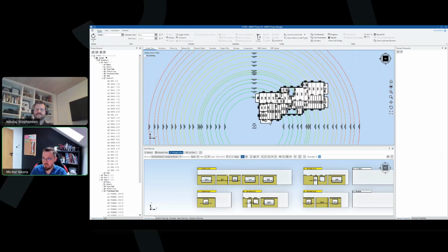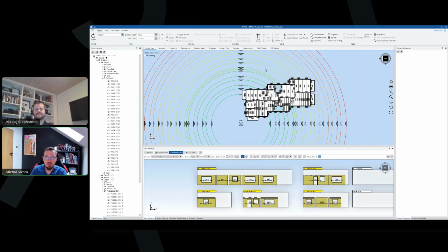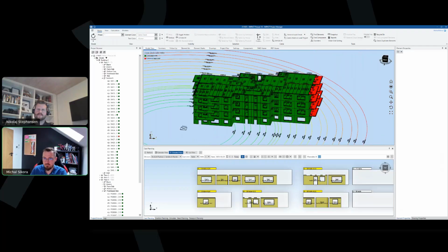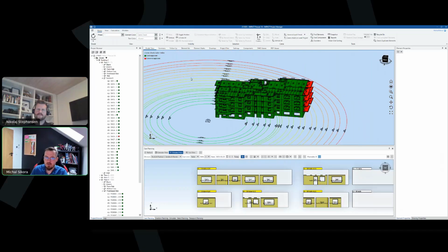If you have not known the exact placement, you can move it to the exact placement. If not, then of course, you can place it where you expect it to be. And you can verify with a general load check on the elements. Software will run and it will mark up, for example, which elements are in compliance for capacity and range. Basically, either green good, red bad.